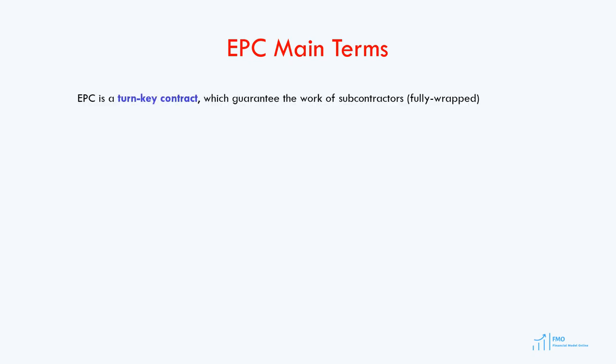The EPC contract is a turnkey contract, and the EPC firm guarantees the work of subcontractors. It is a fully wrapped contract where the EPC firm handles every aspect of engineering, procurement, and construction. The turnkey contract means the EPC firm will deliver a project ready for operation once construction is complete — the sponsor only has to turn the key to start operations. The cost of the project in the EPC contract is typically fixed, so the sponsor, the EPC firm, and most importantly the lender know in advance what the total cost will be. Under the EPC contract, the EPC firm is responsible for construction cost overruns; therefore, it is called a fixed price contract.